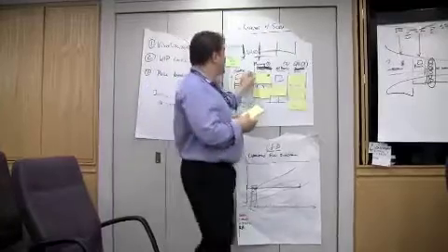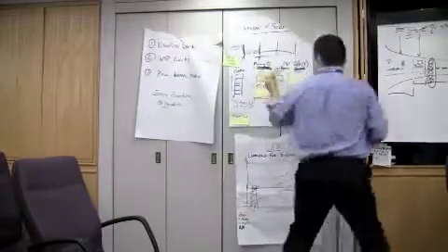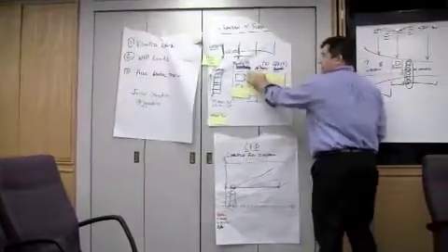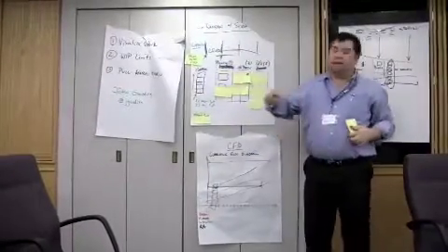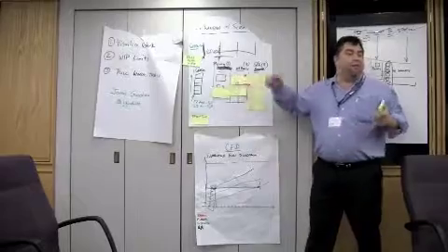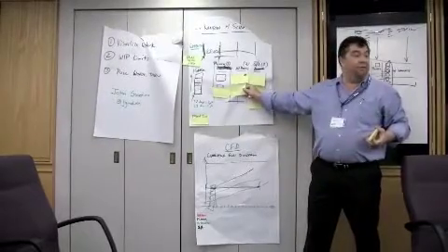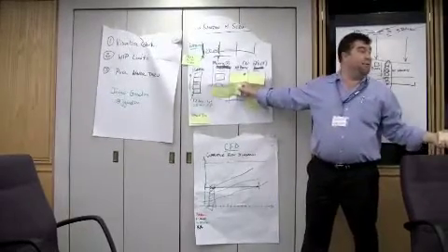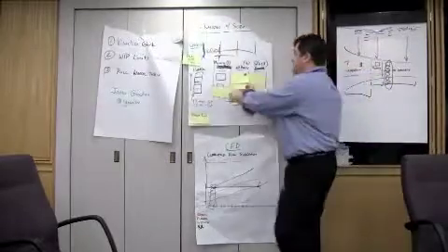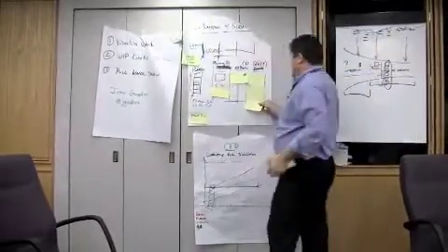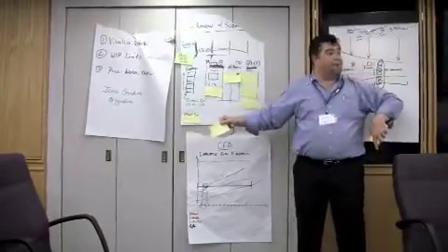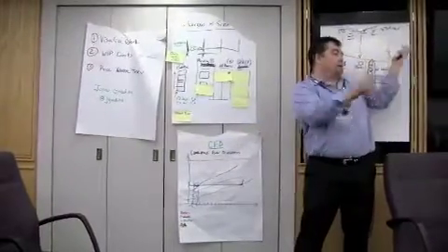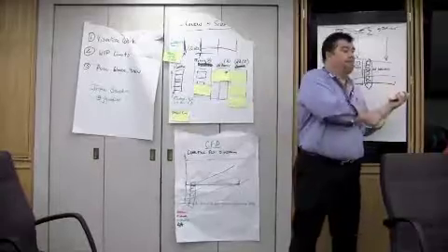They pull the work through and sign up for it. What happens next? Say they're chugging away and these guys finish this feature. They want to go work on the next feature. That's what we do today, right? Developers finish something. Today they would just stack it up on QA and go start some more work, right? And what happens? At the end of the day, you got a whole bunch of stuff stacking up in your system and nothing's getting done fast.